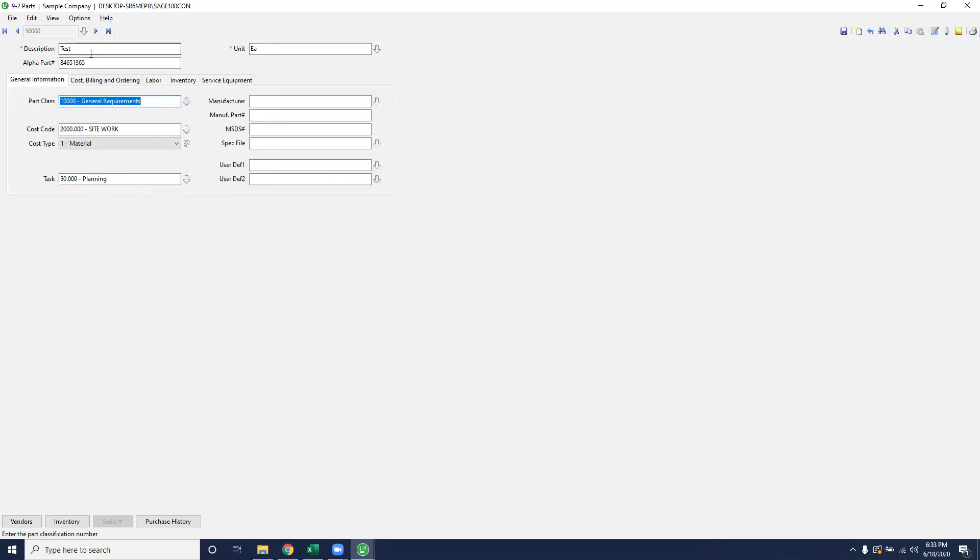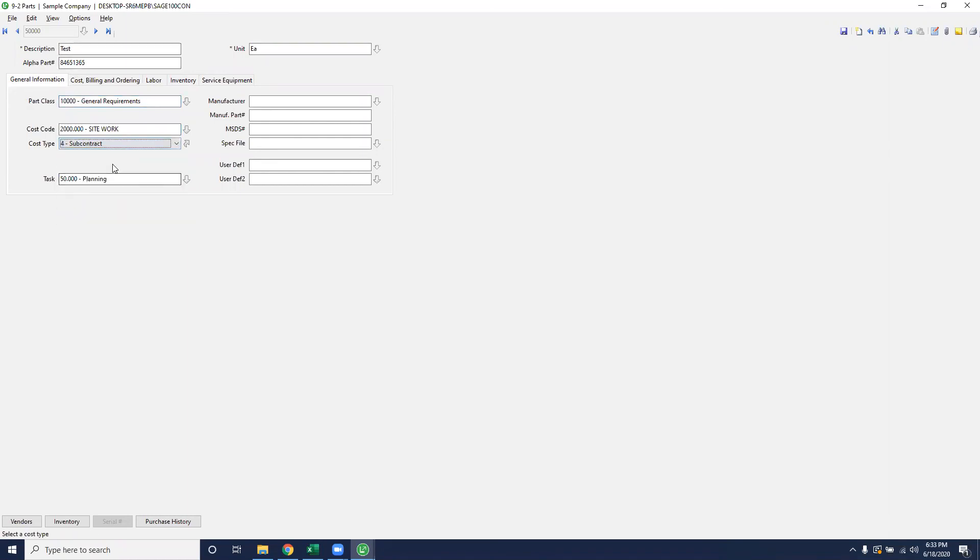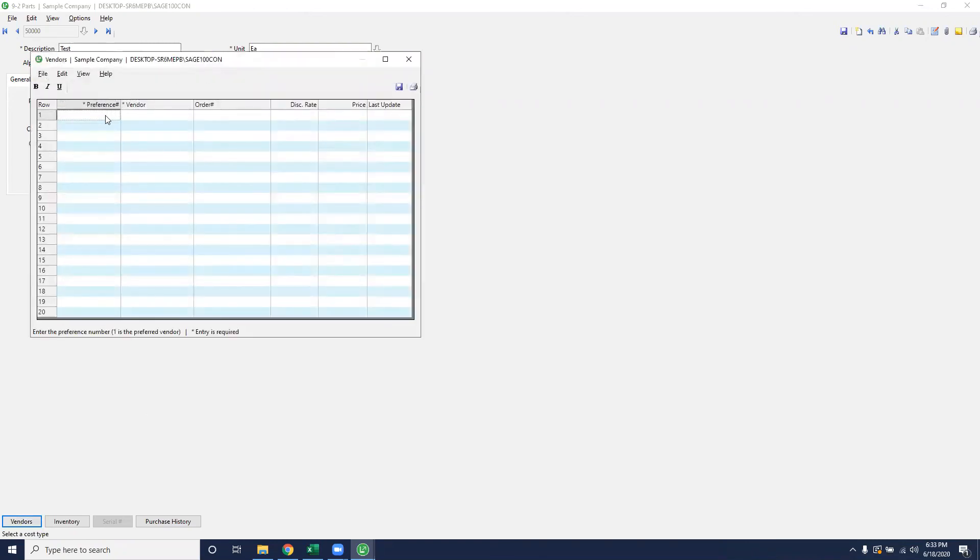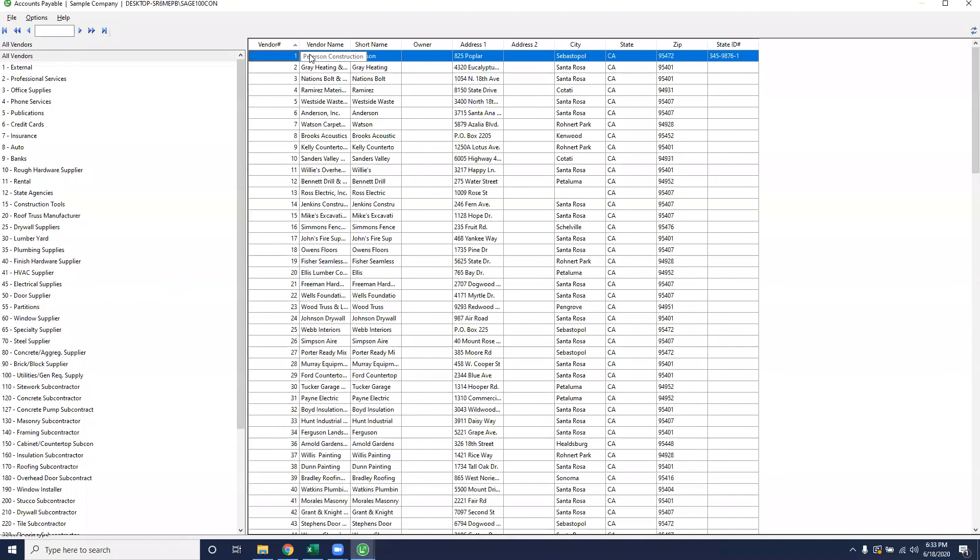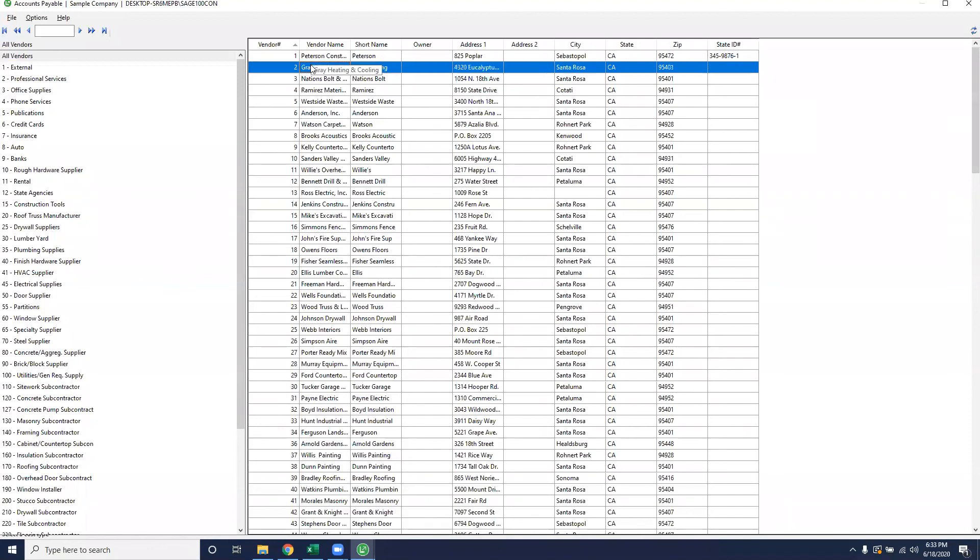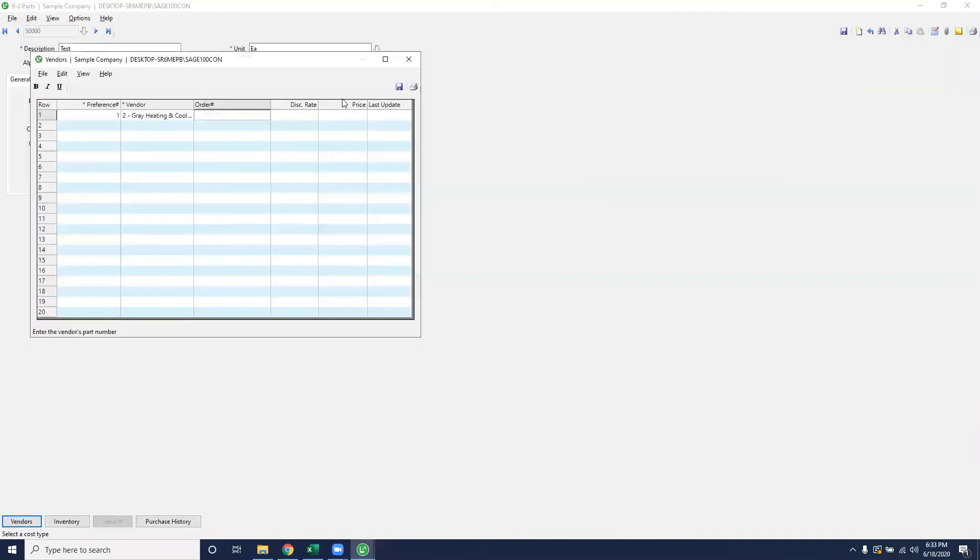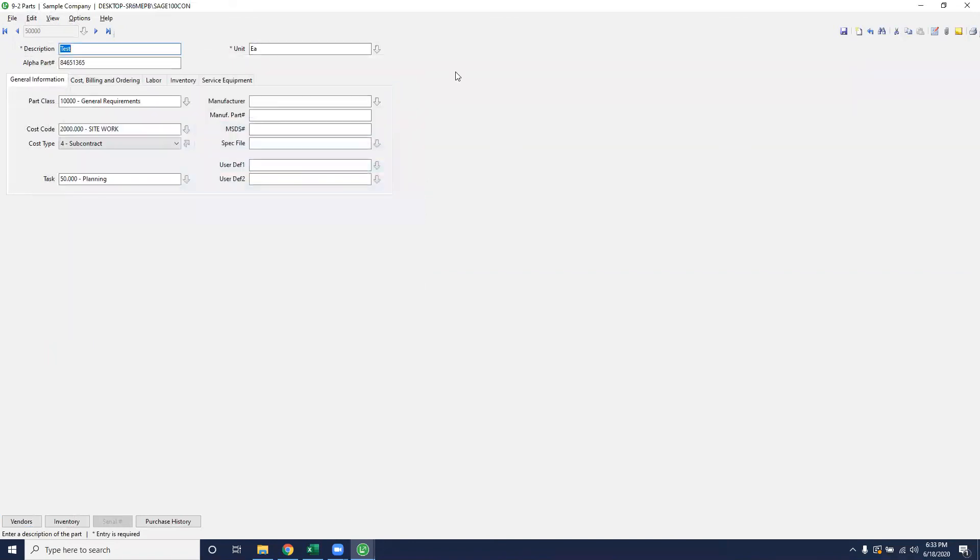If this part is going to be subcontracted, so let's say that this test is now going to be, we're going to sub this work out. We have the option to add in vendors at our preference for each part. So if I want gray heating and cooling to do the work for this, I'll update them. And whenever I put this on the takeoff, it'll pull through gray heating and cooling to do this work. So then I can export my subcontract directly from the grid. We'll go into exporting later, but this is how you enter a basic part in Sage 100 to then put into your takeoff as part of the estimating model.